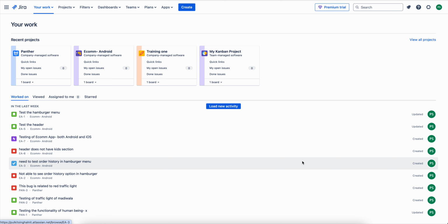A sprint is a time-boxed period during which a specific set of tasks, user stories, is completed. It can be a task or it can be a user story. It's a core concept in Scrum, which is a popular agile framework used in managing and completing complex projects. It can vary from 1 week to 4 weeks. It generally depends on the project, and it also depends on the team's preferences.